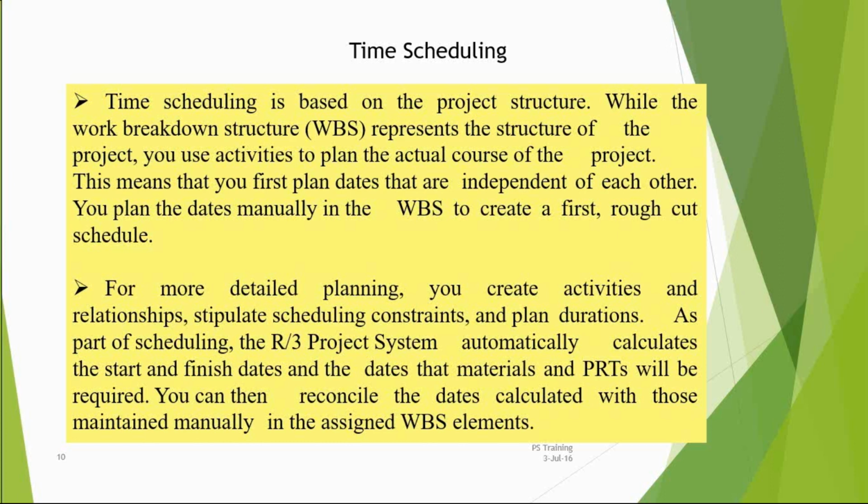And in the same way, whenever I'm assigning materials to this, my system automatically determines my material execution dates. I mean, when I'm going to procure my materials and when I should get them, it will automatically determine that. It will take the dates from its activities only.